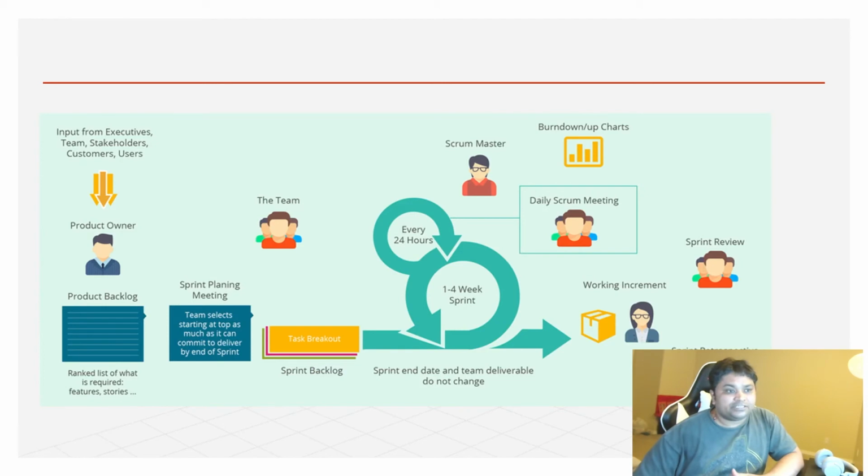In the typical agile or scrum world, which we also used to follow, we decide how much time one sprint will take. It can be 1 week, 2 weeks, or 4 weeks, depending upon your team. You decide, hey, I want to go with a 2 week sprint period. Generally we worked with 2 week sprints, and some sprints are 3 weeks to align with the whole year.